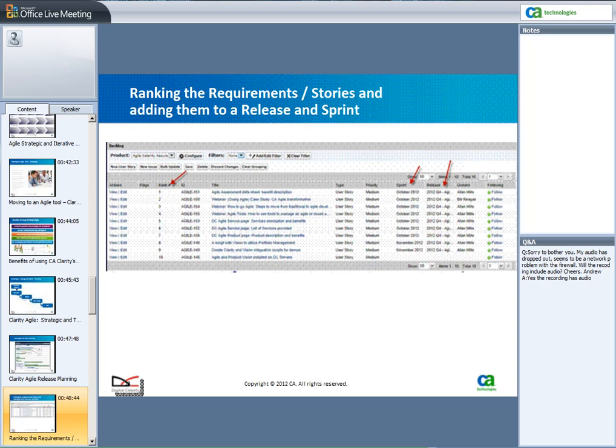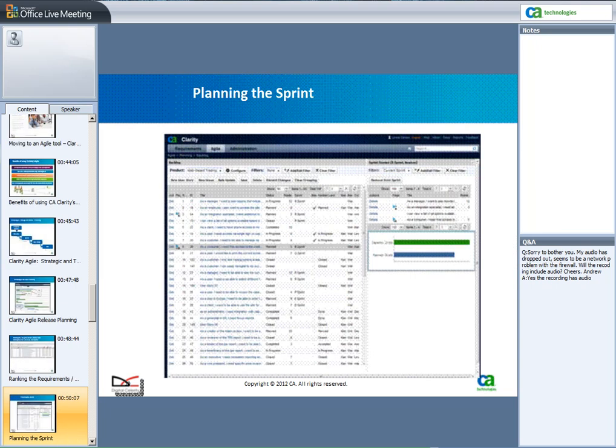So now driving down, so far we've been through the release, we've been through the release planning, which is your detailed backlog of those stories. Now we're actually into the sprint itself. And within the sprint itself, the team would actually pull those stories that were designated for that specific sprint, and they would actually go in and first of all look at the ranking. They would actually do something they call, in estimating in Agile, you would use a point system. And the point system is a relative system that enables you to see the relative number of points between one story and another. It just is a way to kind of weight those stories and say, well, I think it's going to be 12 points, and as you see here, there's 12 points for the first story and 8 for the second.